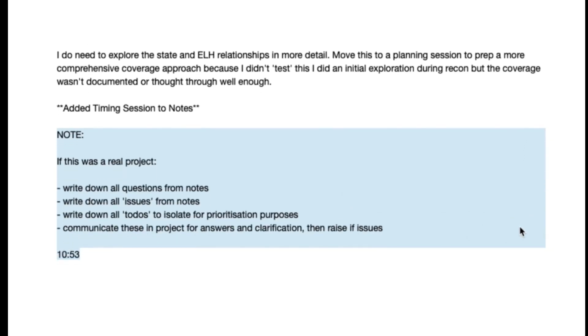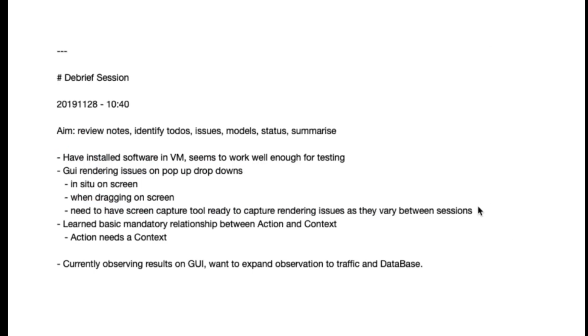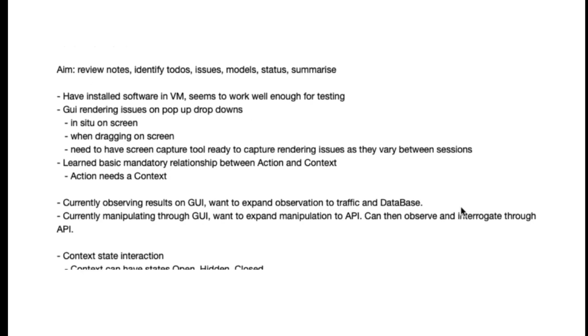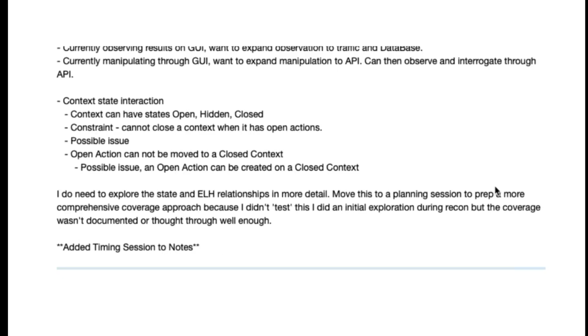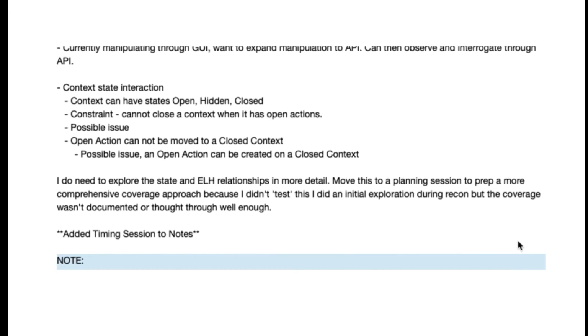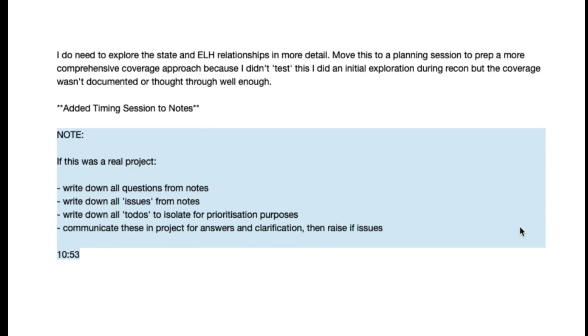So this is a way of pulling out more value. Debrief is absolutely key. It's why at the end of the day, I will look through my notes and debrief and write down what went well, what didn't, what I want to do carrying forward. Are there any new things I want to track? Am I still on track? My overall goals.